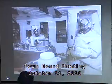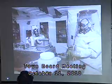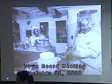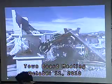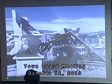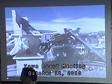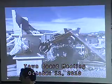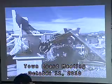Again, the bubble suits. You can see this guy out here isn't wearing a respirator because they're actually in the double bubble suits, and then they're in a bubble tent. So really trying to control airflow in these buildings. This is taking down one of the buildings outside. A lot of the buildings were able to be disposed of as municipal landfills because they were free of contamination, but some were taken down as low-level waste.